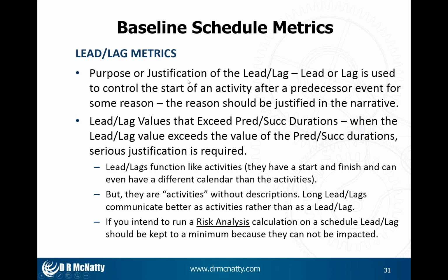I could put lead and lag anywhere, but whatever reason I have should be discussed in the narrative. I also look for leads and lags that exceed the durations of my predecessors and successors. These I'm very suspicious of, and I want to know more about them.